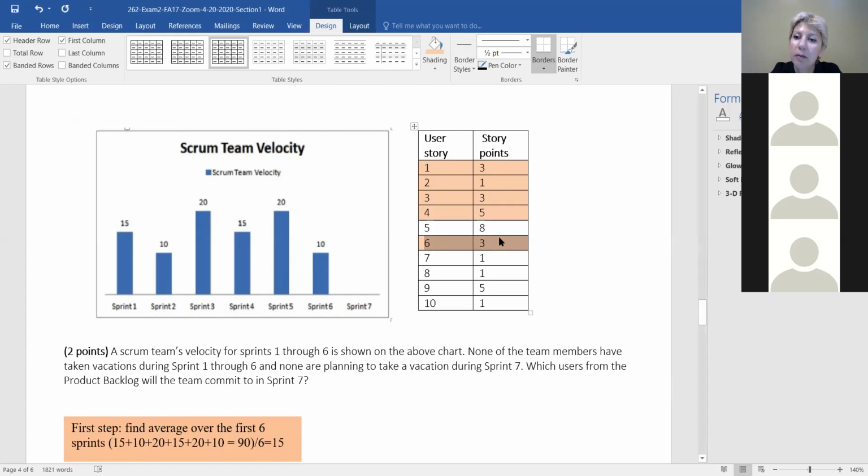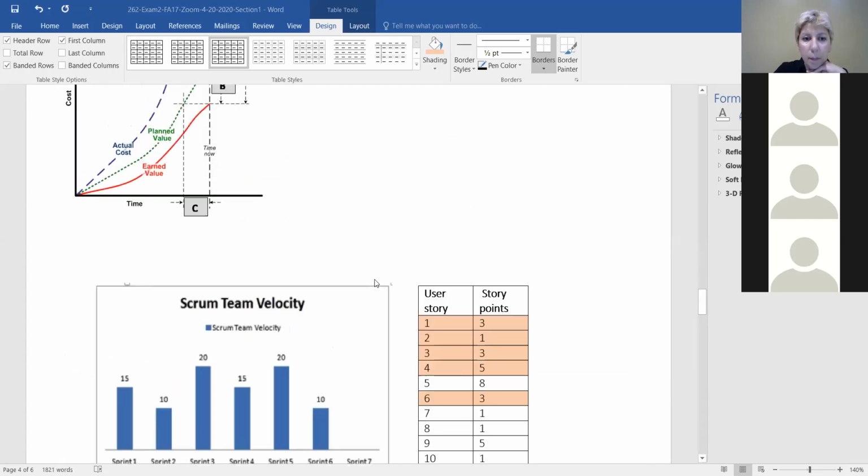Why do you start at the top of your backlog? Because those are typically the ones that are prioritized by your team. It's exactly. It's not typically. Your backlog is always a list of prioritized features, user stories. That's the definition of backlog. You groom your backlog. Make sure you take your items out, add in, but whatever you add, whatever you remove, the result would still be a prioritized list. That's why we pick at the top. We don't want to overwhelm our team. That's why we skip number 5.